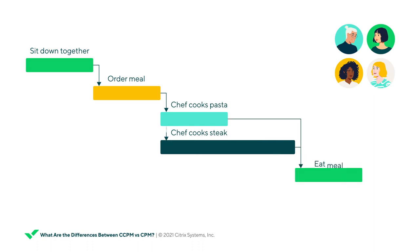Therefore, eating the meal, activity five, can't be finished by the entire group until all meals have arrived at the table. The longest route from activities one through five is the critical path. The two diners who ordered pasta have total float of 10 minutes — the amount of time it takes the cook to finish the steaks. They have flexibility with regard to when they start eating because such a delay won't delay the dinner ultimately finishing.